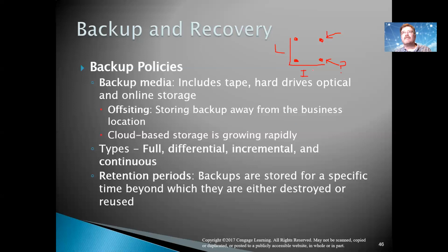do you create a plan for that? I mean, it's not very likely to happen, but it's a pretty big deal if it does happen. How do you mitigate that risk? And then over here, in this example, it's not likely to happen. It's a pretty minor impact, and screw it. You're probably not going to spend any time on that.